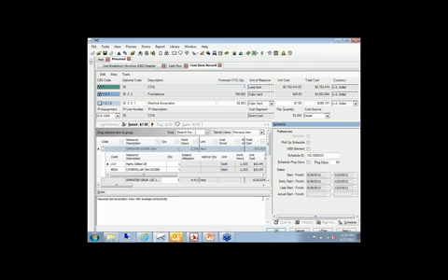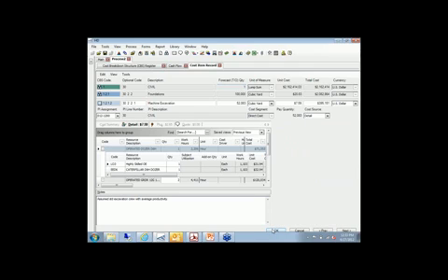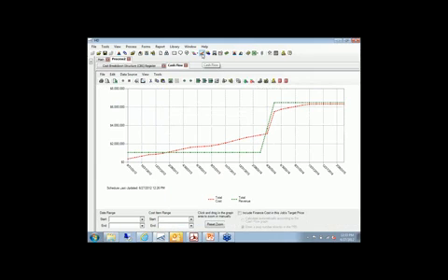So one of those things is cash flow. If we go and look at a cash flow graph, hard dollar is giving us visibility now to what our cost looks like, which is the red dotted line on that graph, and the green dotted line is our revenue. So one of the things we hear quite often, especially from the contractor or consultant, engineer, EPC community, is can we model not only cost, but can we model revenue as well? And with hard dollar and Primavera working together, the answer is yes. And you can see in this case, the costs are ramping up as you would expect over time based on our schedule and our estimate.